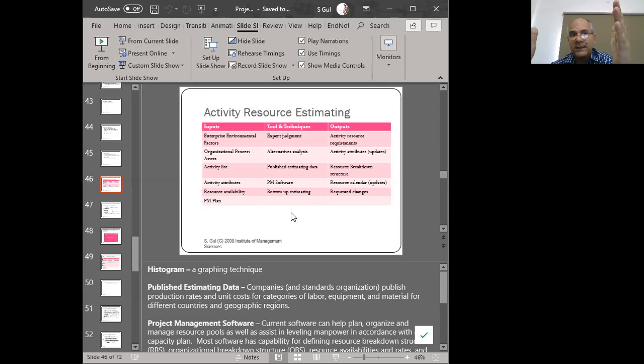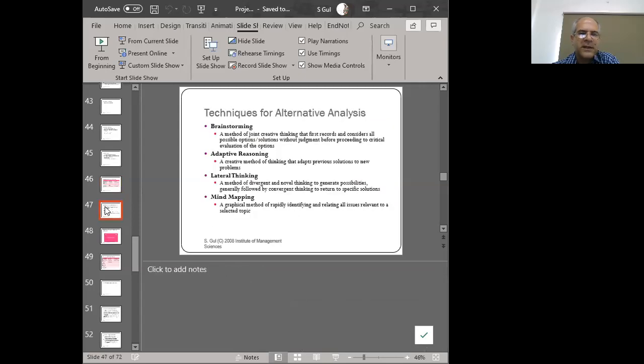Right? Now, normally the WBS is a decomposition. So we're taking the project and breaking it down into smaller pieces. Then we're estimating the time and the cost and the resources at the smallest level. And we're adding upwards and upwards and upwards, and then providing the overall estimate of the cost, the time, etc., for the project, right? So if you are using the WBS, then you are doing something called bottom-up estimation, and it's also technically called rolling up the WBS. So you open it up like a scroll, and then you estimate at the lowest level, and you scroll it back up, and you roll it up. So that's why it's called rolling up of the WBS. Now, alternatives have to be identified.